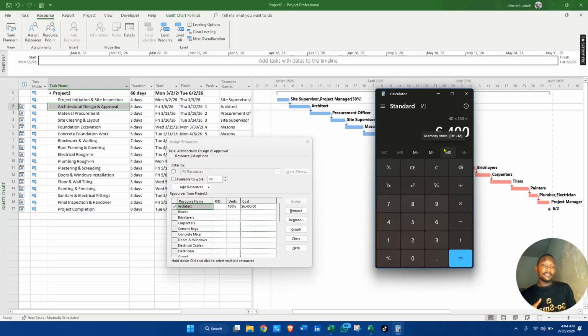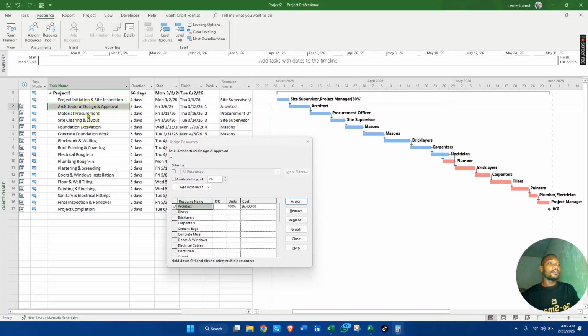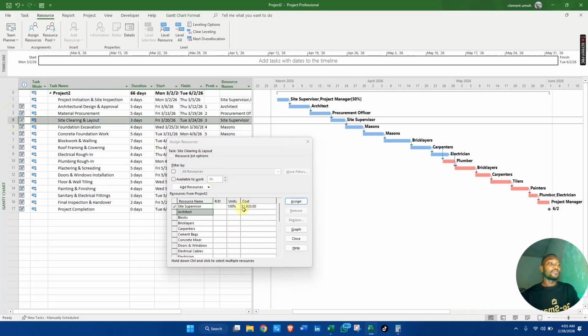$106 multiplied by 8 hours and multiplied by 5 days. So at the end of these 5 days, we're paying him this cost. Do you understand? This is how much it's costing us for 5 days. The same goes for the other guy. This is how much this guy is costing us for 3 days. At the end of the 3 days, we pay this guy his money, then he goes. Or we sum it totally and pay him, then he goes. Anyhow you want to do it.